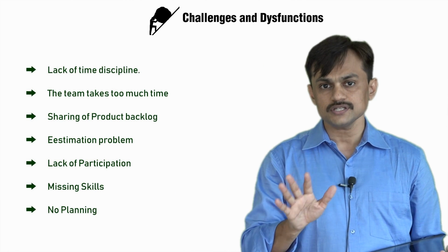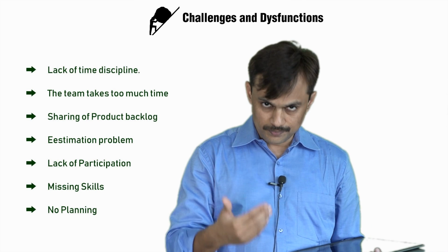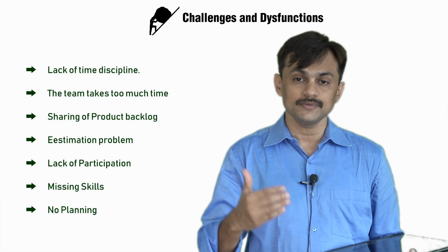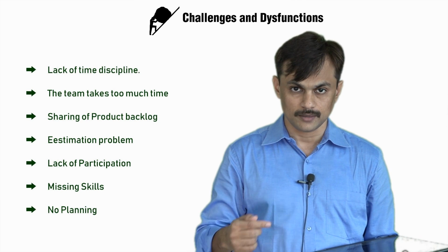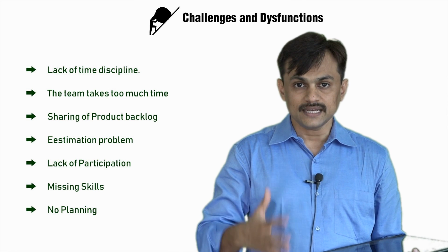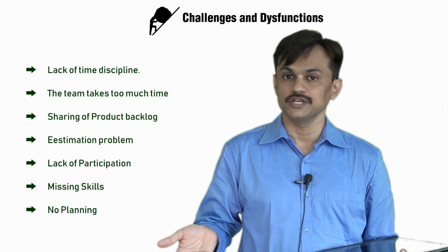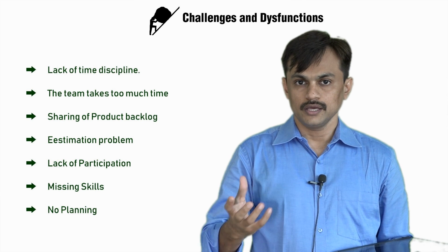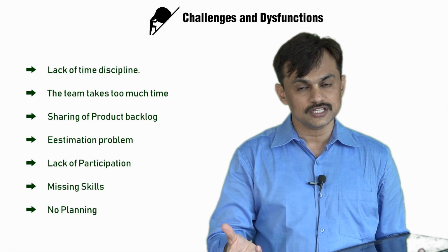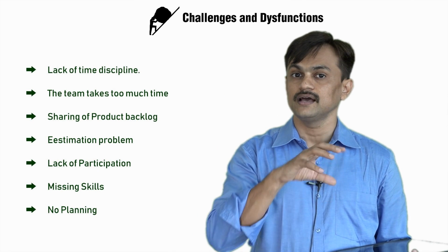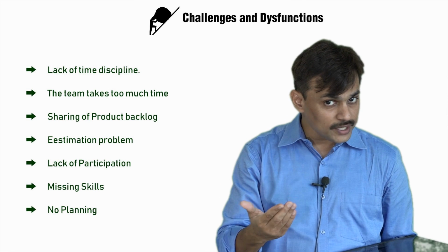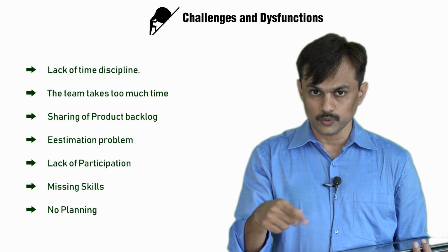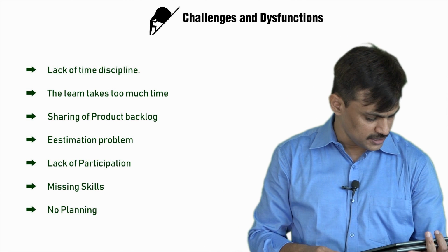Now in these kinds of situations, if you organize frequent, organized backlog refinement meetings, the team members are aware what kind of product backlog items are coming for a sprint planning meeting, and that can speed up the discussion during sprint planning. Another thing which a Scrum Master can do is provide advance information in the form of email or documents before the sprint planning meeting about those backlog items and the details attached to them. You can experiment and see how it helps you make your sprint planning meeting go faster for backlog items.